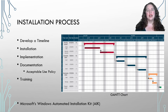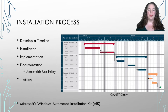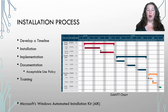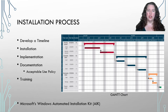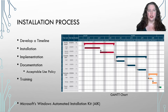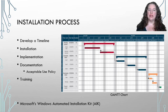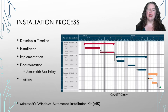Finally, give yourself time to train your users. Help them understand how things have changed — did you change the directory structure? Help them find their printers or shared network drives. Give yourself time in your timeline to train your users. This type of timeline is called a Gantt chart — G-A-N-T-T, two T's at the end — named after the person who came up with it. It's the style of breaking down time across the top, tasks down the side, and seeing it visually.